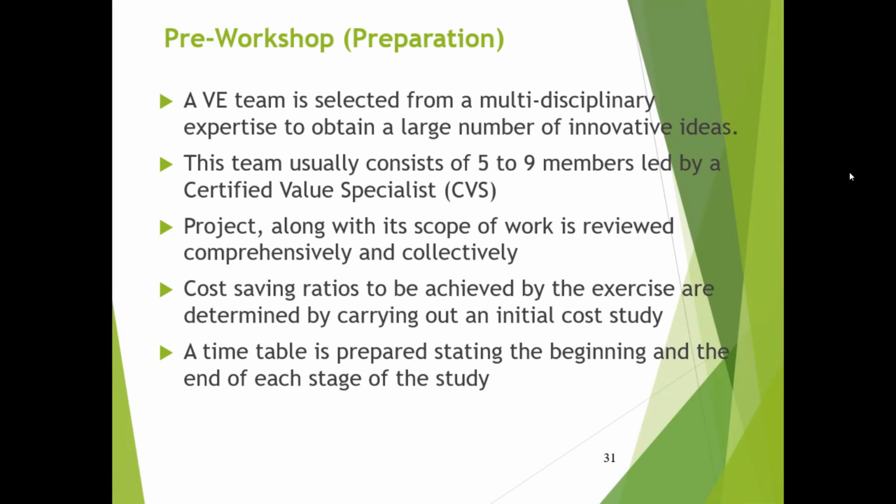And so the team usually consists of 5 to 9 members, again depending on the scope of the project, right? So it is led by a certified value specialist, CVS. Similar to the professional institutes, there is an institute of value engineering professionals.